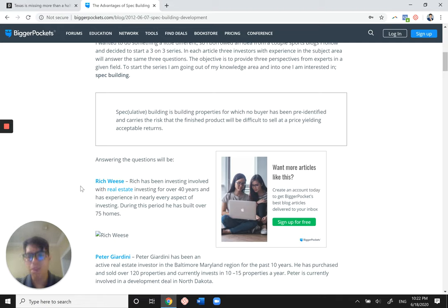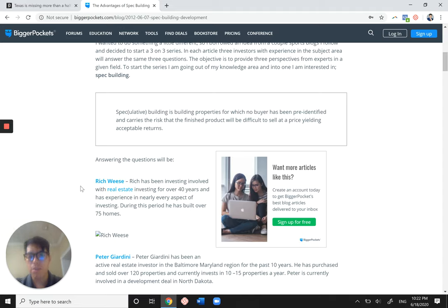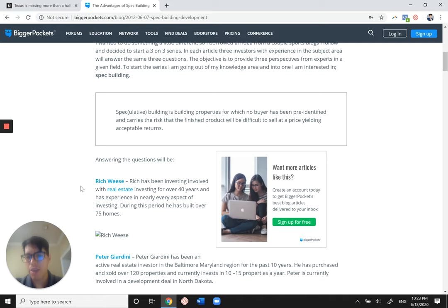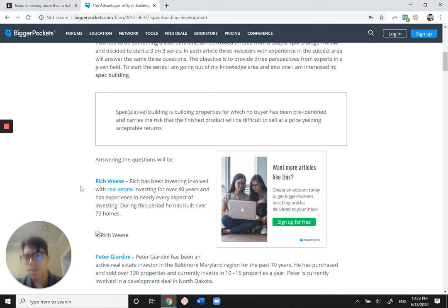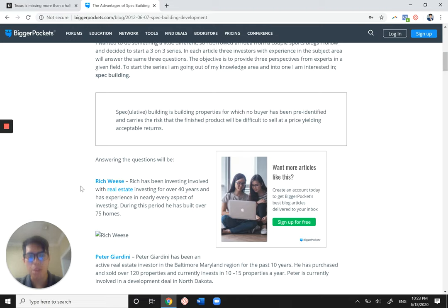You obviously have the house inspected, but you could maybe say, okay, this home needs $50,000 worth of repairs. And then you get into it head first and you find out, okay, maybe it needs $60,000. So you're having to scrounge up $10,000. So we have unforeseen, unforeseen costs.